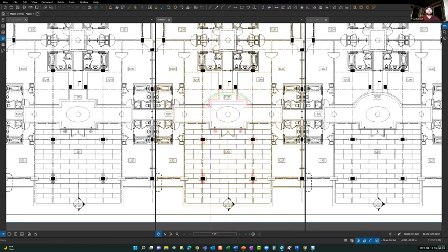This is also used for a real rough clash detection or seeing how different disciplines can relate to one another. So I've seen it where we've overlaid a structural and a mechanical plan so that we can see if the ductwork is hitting the structural beams and things like that. You can overlay, they don't have to just be used for revisions. We can overlay different disciplines as well.